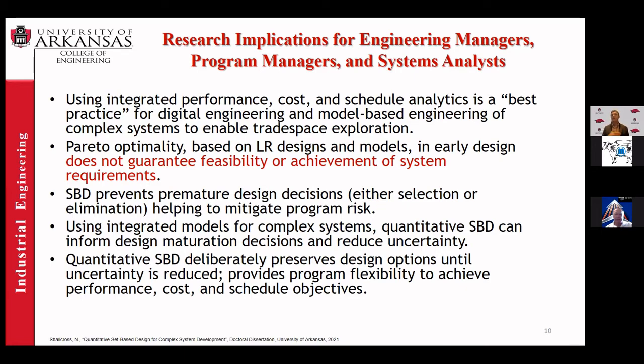Of course, as you increase the resolution of the designs and models, that does help you get to a closer guarantee. You can't always completely 100% guarantee, right? But it does move towards feasibility or closer to that uncertainty resolution. Three, set-based design does prevent premature design decisions from either being selected or eliminated, which helps mitigate program risk.